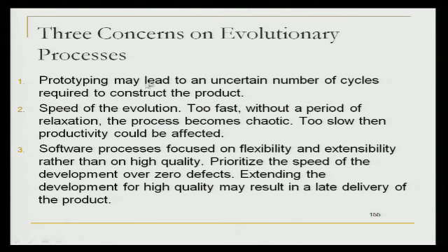Prototyping could lead to an uncertain number of cycles. One of the things about getting feedback from a customer or a user, I guarantee you, if you show your prototype to a large number of people, you will never, ever get a consistent answer. Everybody's going to have a different opinion. And if you keep doing that, you'll never stop. You'll never get everyone saying, yes, that's it. So you have to know when to stop. If you don't, that could be a big problem and cause delays.